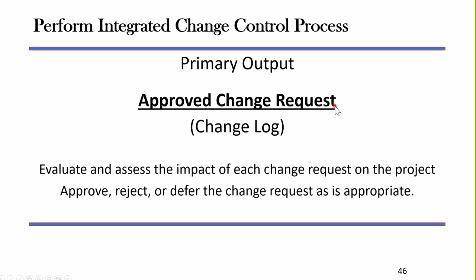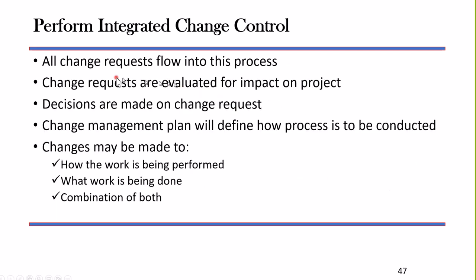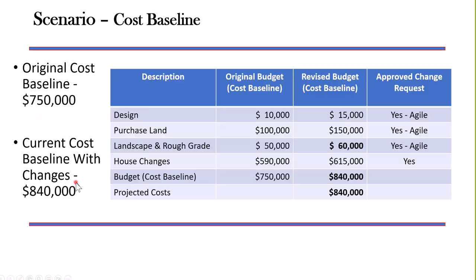If it's a scope, cost, or schedule baseline change, I will then update them to reflect this new information. All change requests flow into this process. We make a decision on those changes. Here is an example of a change request. Remember our cost baseline we had earlier? We have a cost change here.